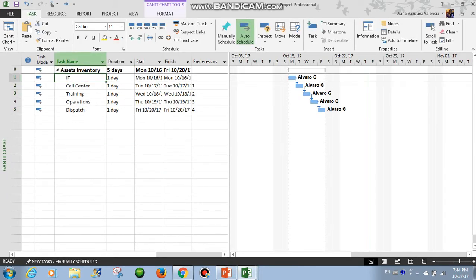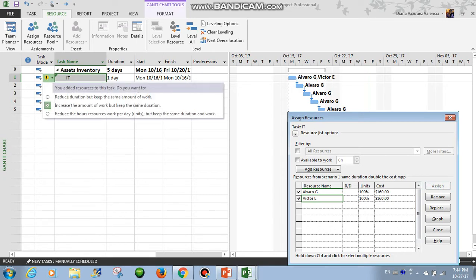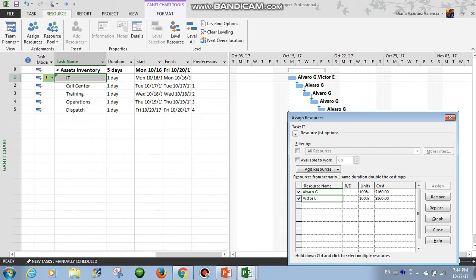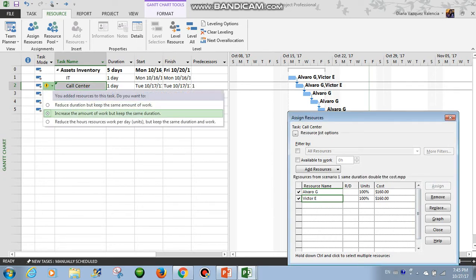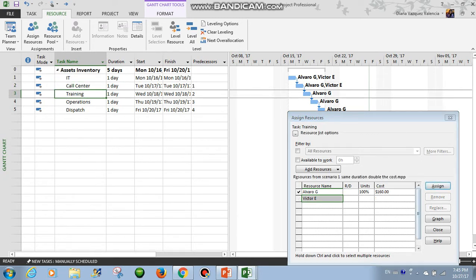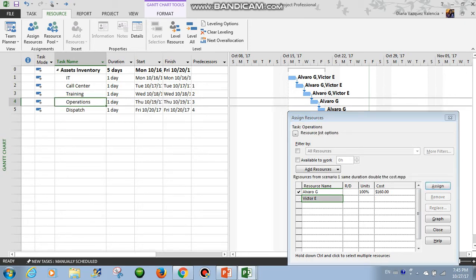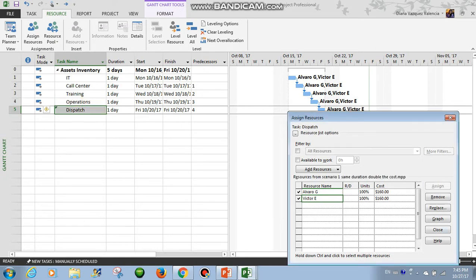We will work with the default scenario here. We will assign a second resource, that will be Victor. Here in the exclamation mark, we have the options I was telling you about. The default one is: increase the amount of work but keep the same duration. So this means that the task, the work, is more difficult to do than what we thought. That's why we need another person to come and help Alvaro. So they will work full time in this task.